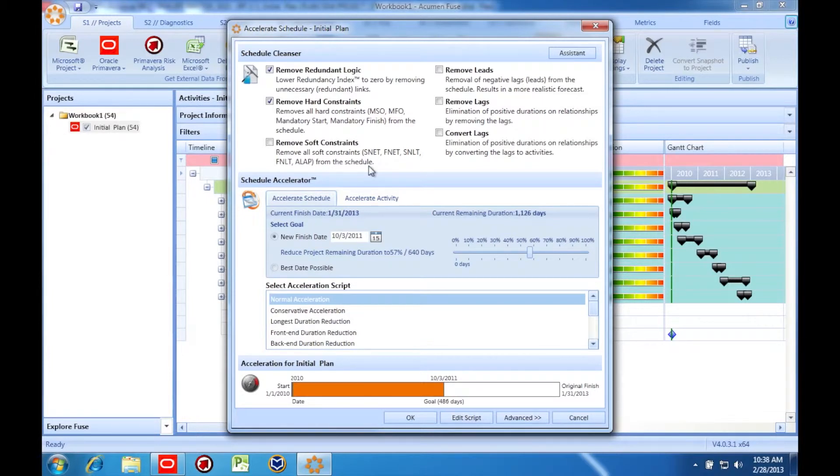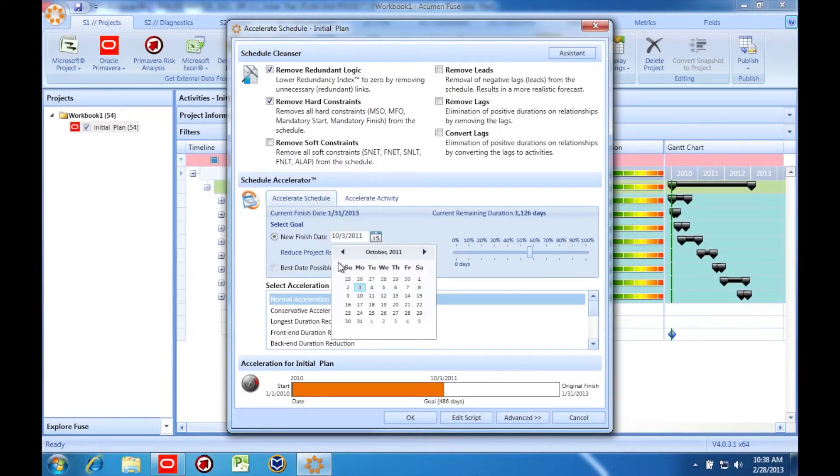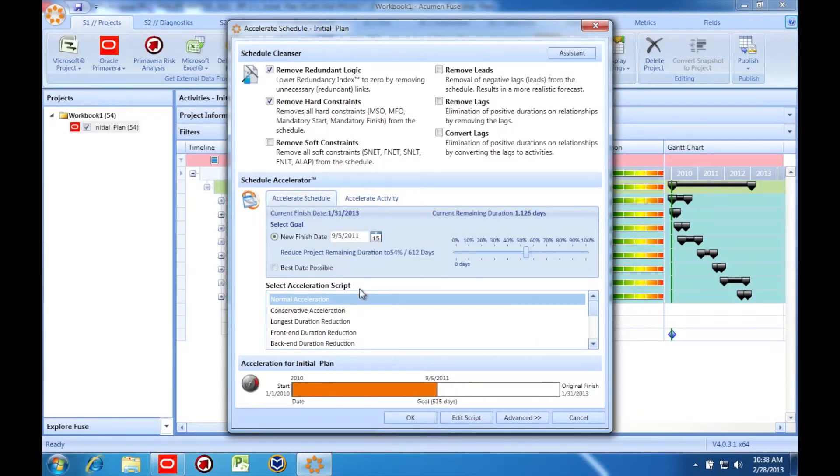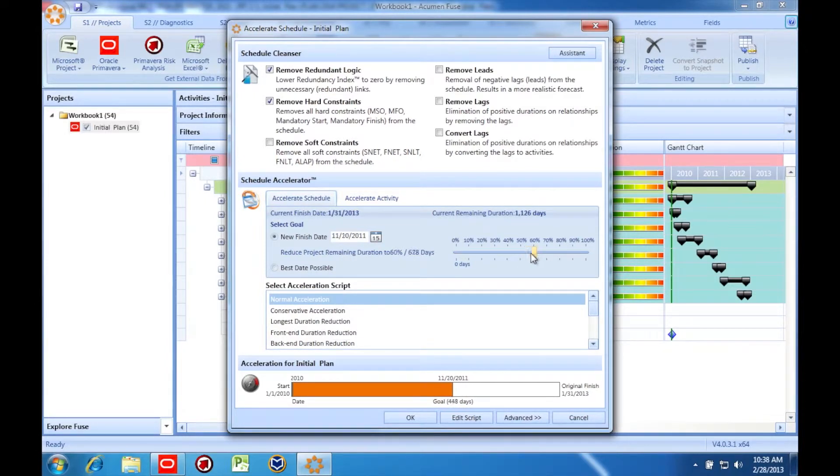Once we determine which items to cleanse from the schedule, we select our desired completion date in the schedule accelerator. Or, we can use this slider to establish a goal completion date. Next, we select the appropriate script to use.